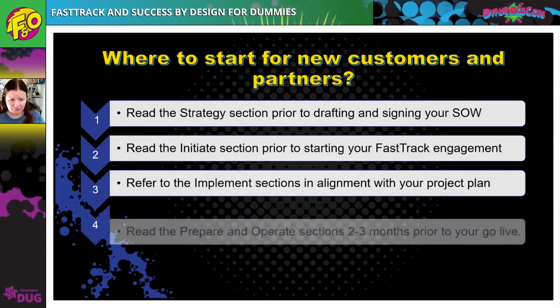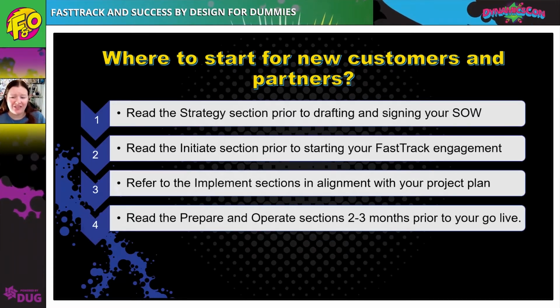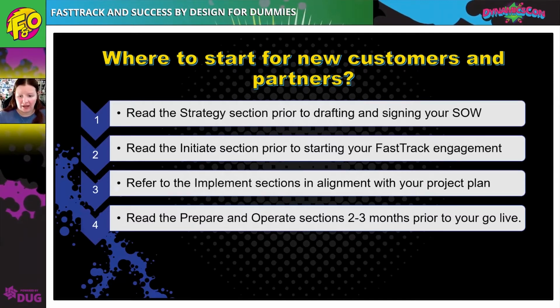Next, I would recommend that you read the Prepare and Operations sections about 2 to 3 months prior to the go live so that you have sufficient time to think about and plan for the various activities that will happen leading up to and after your go live.